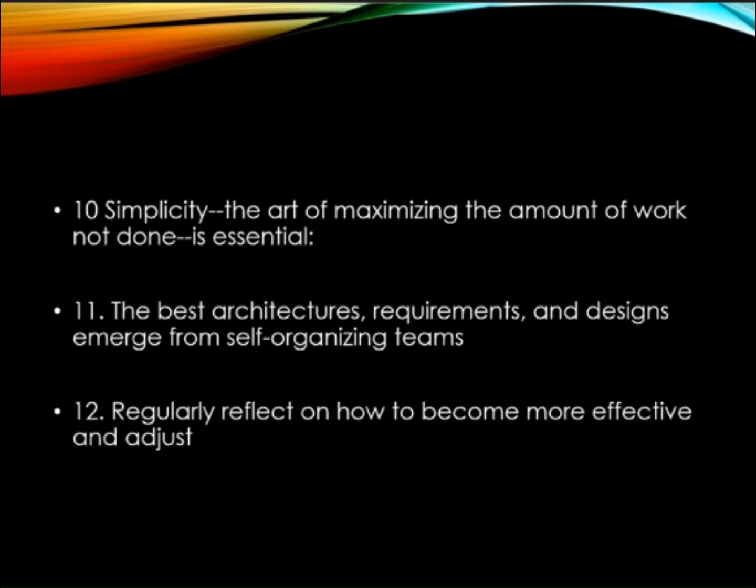Our 11th is self-organizing teams create the best design. Let the team manage their own work and decisions. For example, in sprint planning, team members pick their own tasks based on interest and skill without a manager assigning them.